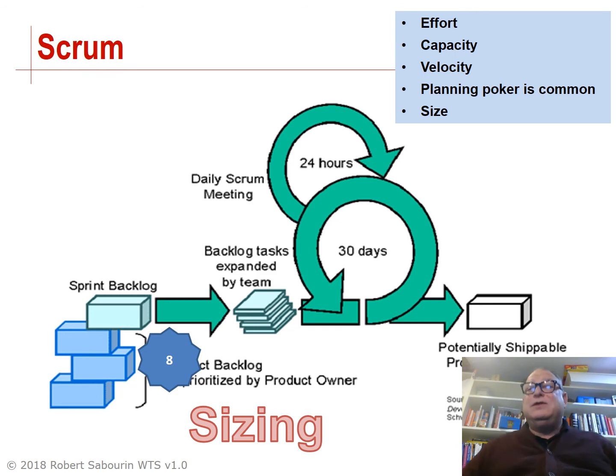Teams often use planning poker to estimate the size of stories. Planning poker is a descendant of wideband Delphi, and that's a team-based estimation approach in which we basically look at new work related to past shared experience.